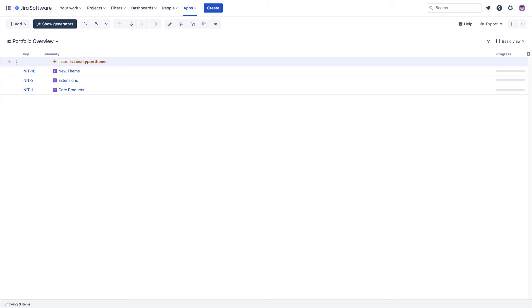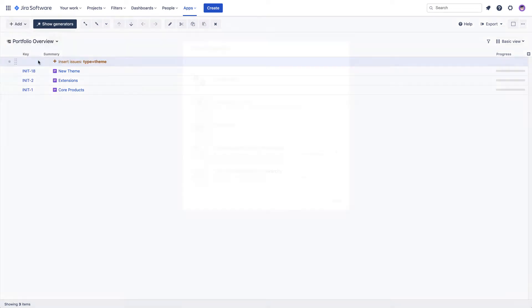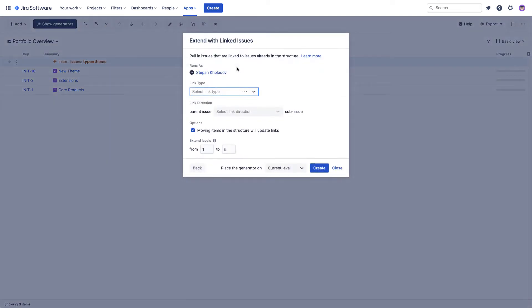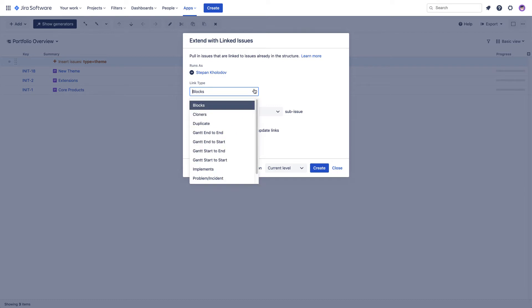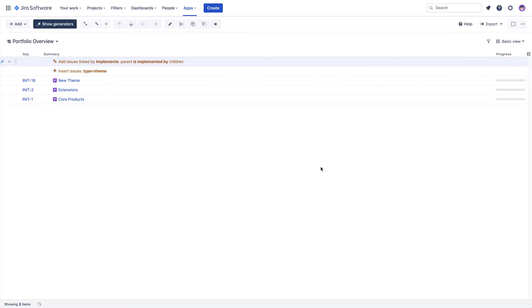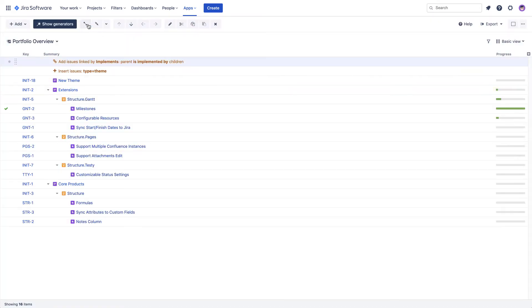Now let's add the initiatives and epics which are linked to our themes. To do that, we'll use the extend generator, which allows us to visualize the different types of relationships that exist between Jira issues, such as issue links, epic links, parent links from advanced roadmaps, and a few others. In our example, we're using the implements issue link to connect our three highest levels. You can now see that our initiatives and epics were added to the structure.